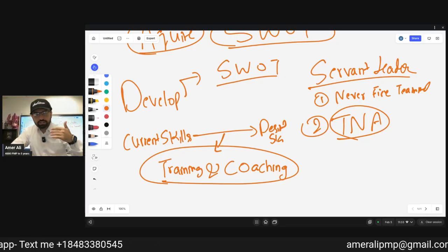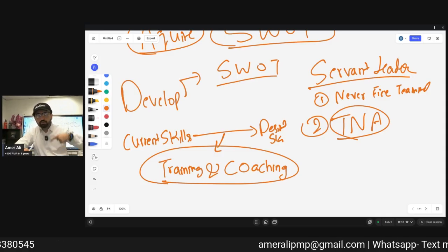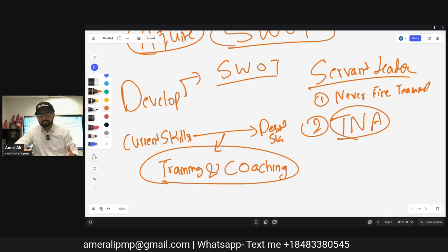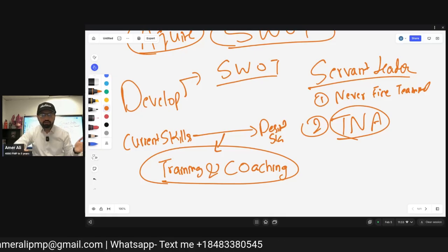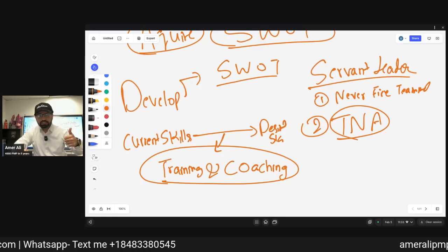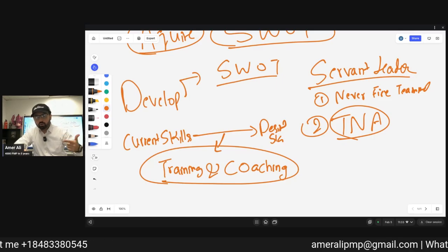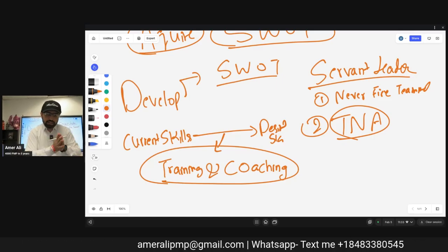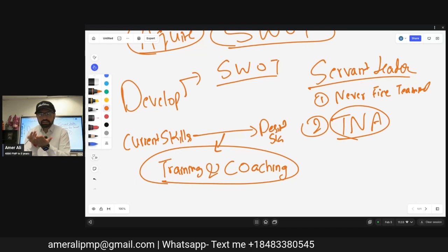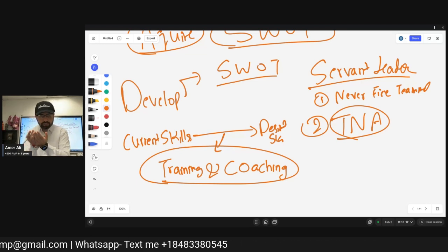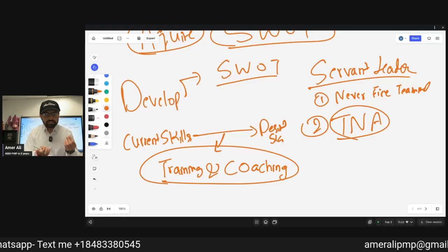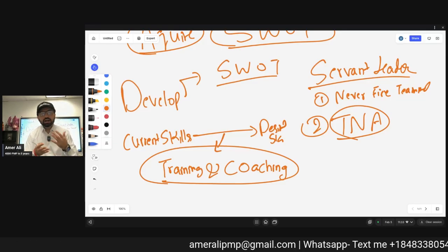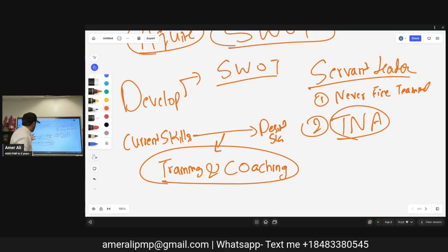You provide them the training, you provide them the coaching, you keep looking at what more is needed, what is missing, what I have, what I don't have. I need to identify the training requirement, the coaching requirement, and how I provide it. I identify the training needs assessment, provide the training, and measure the training benefit outcomes. Now the training is done, is it effective or not? If it is not effective, I do it again.